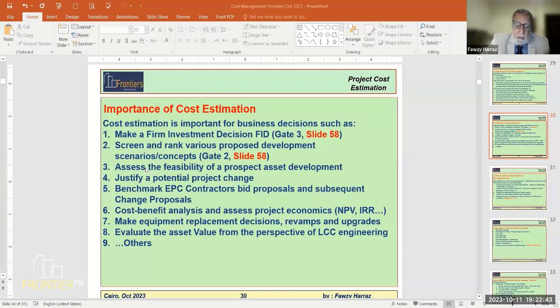Last time we highlighted odd situations on bids, including what we call bid rigging or price cartelling. If the estimator made an internal estimate, say the project estimate is $1 billion, he should be expecting bids in the range of $1 billion 100 million or $1 billion 200 million.